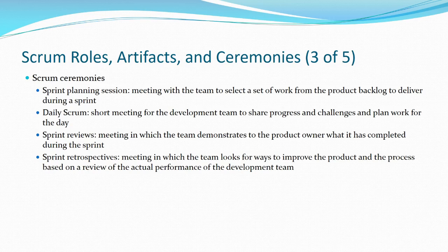That gets broken down further to a daily Scrum. And that just means that you have a meeting that goes no longer than 15 minutes to get everything together for the day or for the Scrum of the week, but you meet daily, no longer than 15 minutes. Sometimes these are online meetings. They're always very direct, and they're very time sensitive.